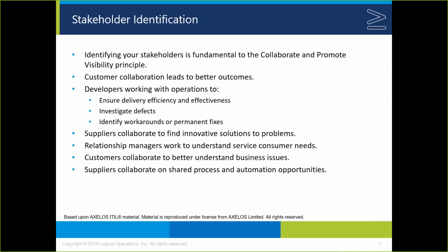So this begs questions like, number one, who are the stakeholders? Who needs what information? Thinking back to previous versions of the guidance, we might use something like a RACI matrix to try to understand how information needs to be coming and going. RACIs aren't explicitly talked through in the foundation guidance anyway, but basically, they provide a model for thinking about things like inputs and outputs.